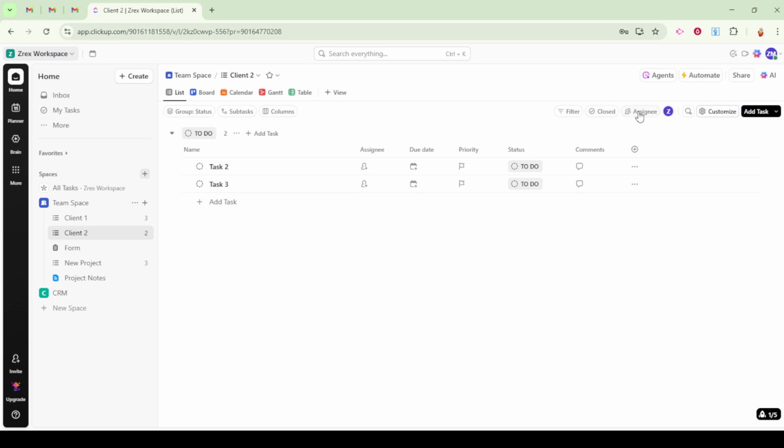Let's not forget about task templates. By creating templates with predefined due dates and dependencies, you set a solid foundation for new tasks. When applying a template, you have the option to remap the due dates in line with the new parent task's schedule, ensuring smooth task integration into your current project timeline.